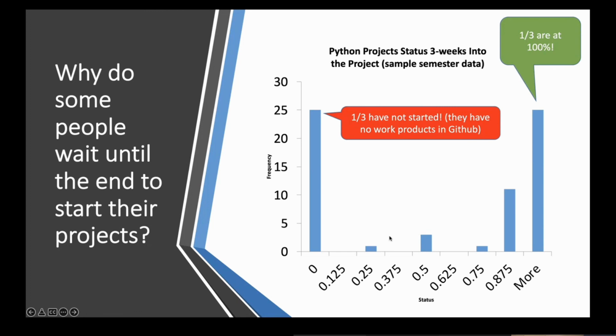Trying to avoid what we call social loafing. You know what that is? That's when you get a team of a sufficient size that members think they don't have to work because the others will do it. So 2 is possible. You get up to like 5, you need more intentional management structure. You get over 5, you really need intentional structure to make sure everybody contributes. I don't want those team dynamics in the way of this project, so I encourage you to work on your own, or you can work with a partner.